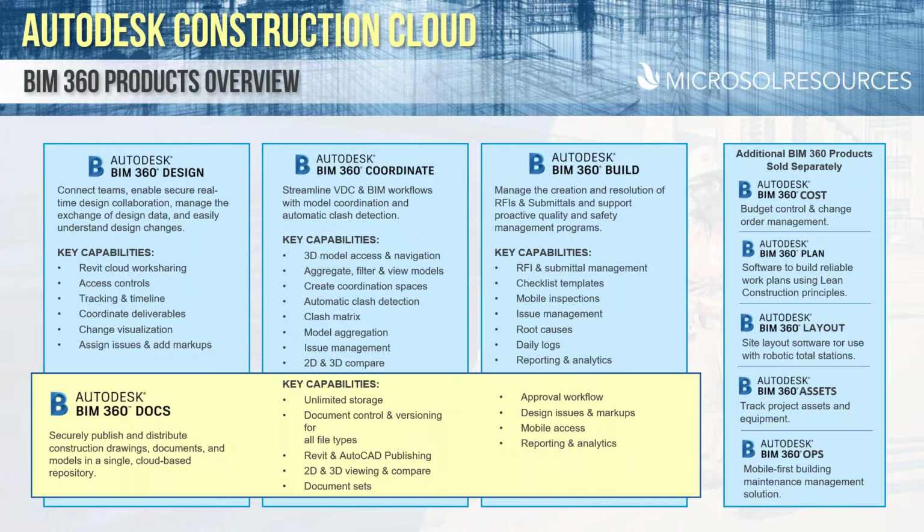So just to quickly go through these, cost management, or Cost as it's called, is a separate module that can be added to BIM 360 through Build, which allows for managing construction costs throughout the life cycle of a project. It includes tracking change orders, managing supplier contracts, and visibility into overall budgetary impacts. A lot of that information can be pulled directly from information housed in BIM 360. By far, that's the most used and the most discussed of the add-on products.